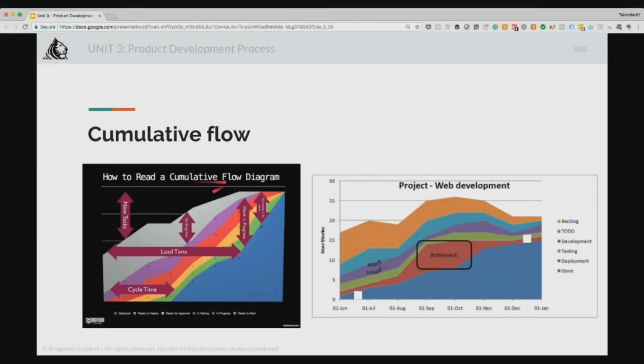Right? So cumulative flow diagram is a key resource for Kanban teams, helping them ensure the flow of work across the team is consistent, with number of issues on the y-axis, right here, which is story points, and the time on the x-axis. So you can see that in all the graphs, effort is on the y-axis, time is on the x-axis. It remains the same. Okay? And colors to indicate the various workflow states, because in Kanban you essentially have workflow states, right? To do, doing, done, right? And developing or testing or whatever the state is, correct?